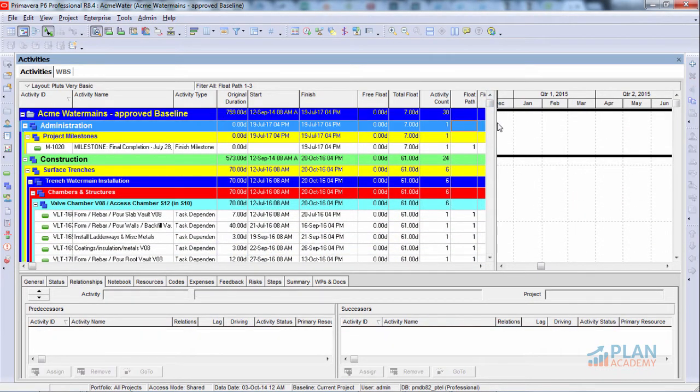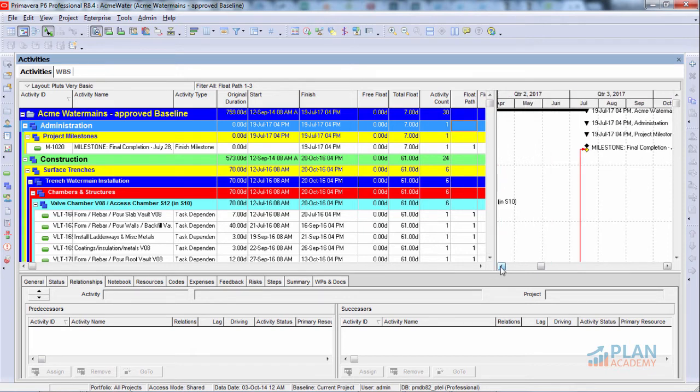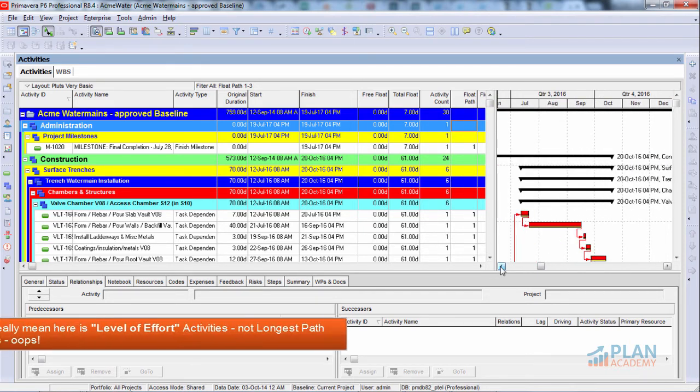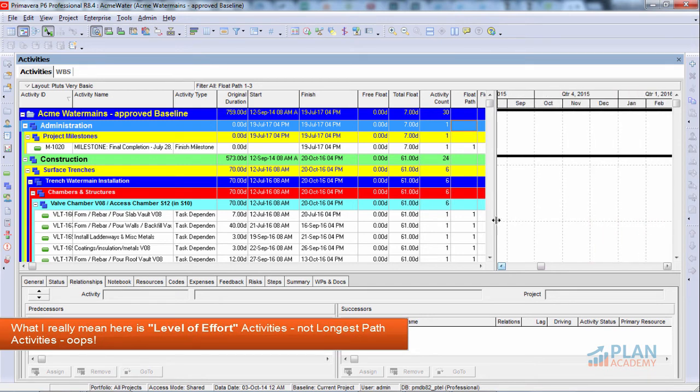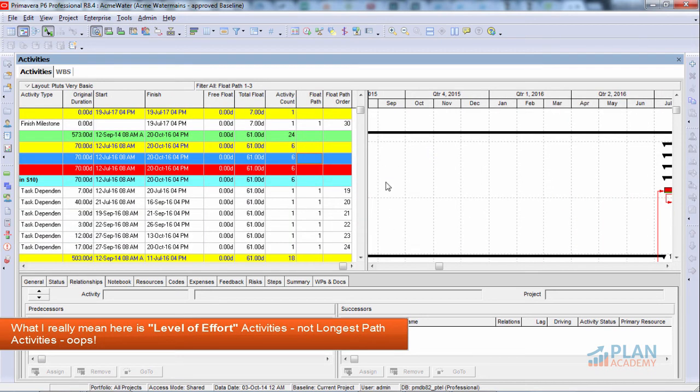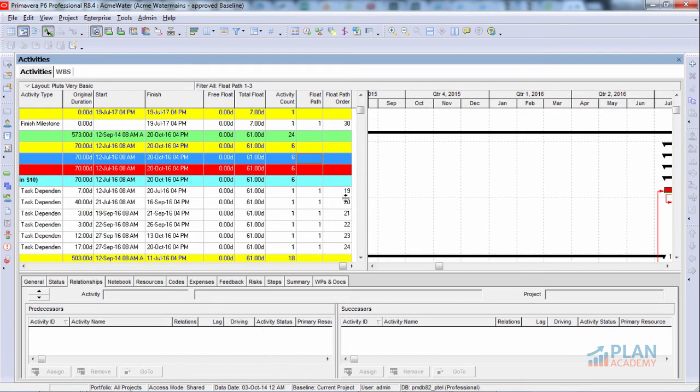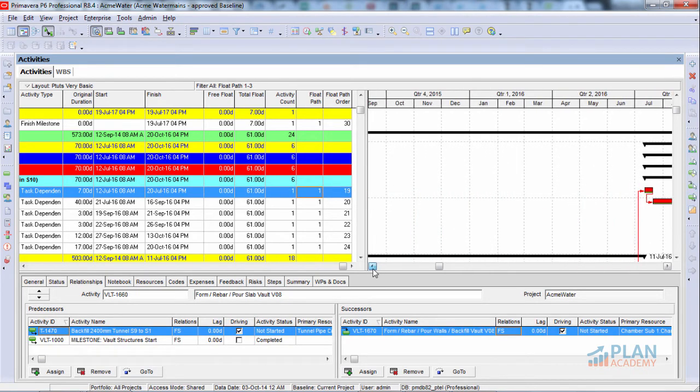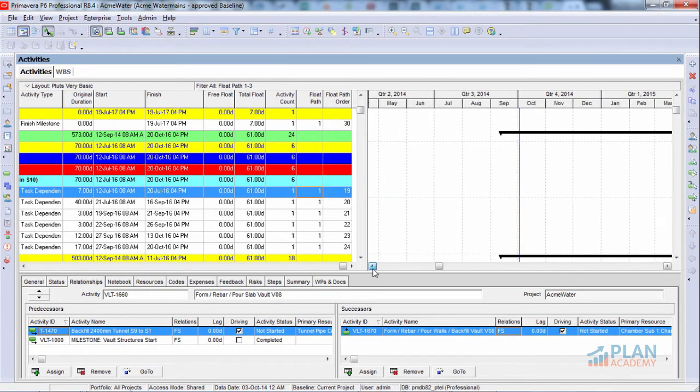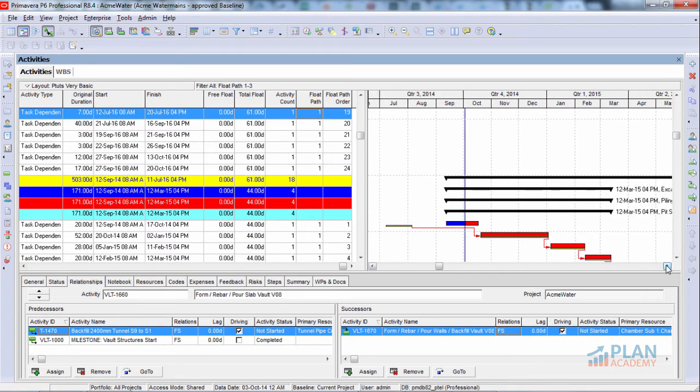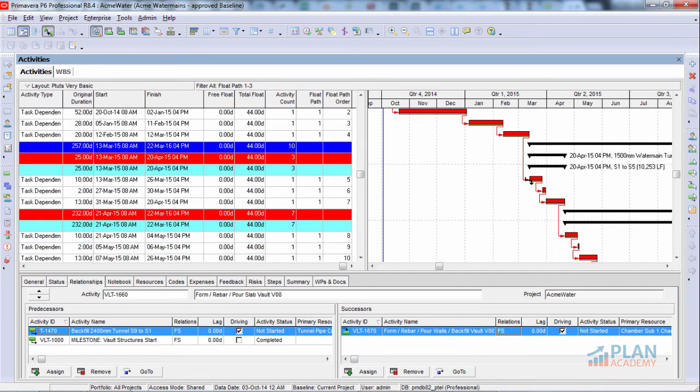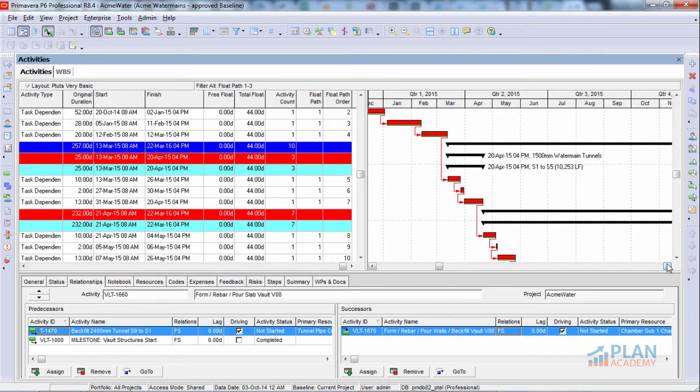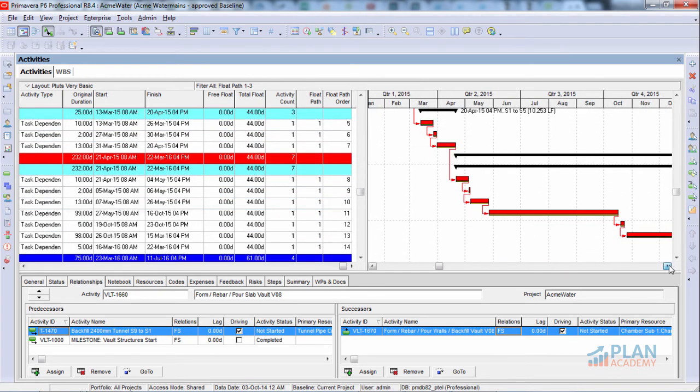Now, first thing you want to notice is in our result, we no longer have longest path activities. Those guys are gone. Okay. And if I scroll this over a little bit so that you can see a little bit more of what's going on in the total float path, the critical path. Here we go. Really, it starts here. You're going to see that I no longer have overlapping activities. So I really have a true float path, a true critical path, a true longest path where the activities are totally contiguous one after the other.